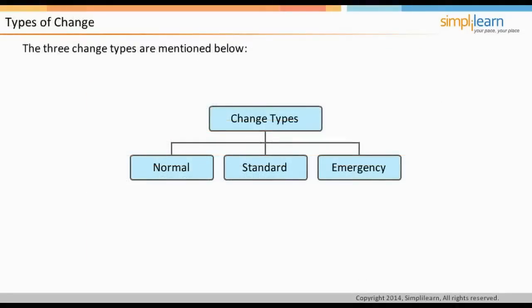The three change types or models are normal change, standard change, and emergency change. A normal change follows all steps of the change process and is assessed by the change manager and approved by the Change Advisory Board. A standard change is a pre-approved change that has low risk, is relatively common, and follows a defined procedure — for example, password reset or provision of standard equipment to a new employee. Emergency changes must be addressed quickly, for example to resolve a major incident or implement a security patch. The organization uses an advanced process for handling emergency changes, and they should be kept to a minimum as the impact and failure chances are higher.